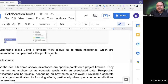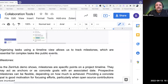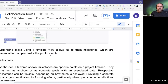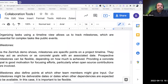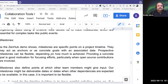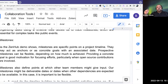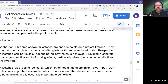This is essential for complex tasks like public events. If I'm hosting a public event, I want a series of tasks and degrees of completion, but also to know when I need to have invites out, when I need to hear back from people, and so forth — tracking internally to that task. Milestones are specific points in a project timeline — they may act as anchors or as concrete goals with an associated date. In Zenhub you can move those anchors out and stretch the length of your timeline visually, which makes things flexible.